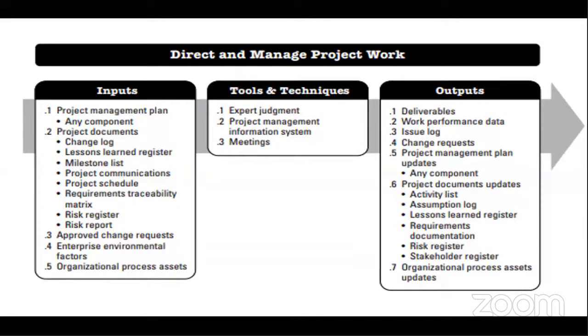Then we'll also have the project schedule. The project schedule will contain the sequenced project activities. It will also contain the duration of those activities. It will also contain the activity attributes and the estimated activity resources for those particular activities that are sequenced in the project schedule.